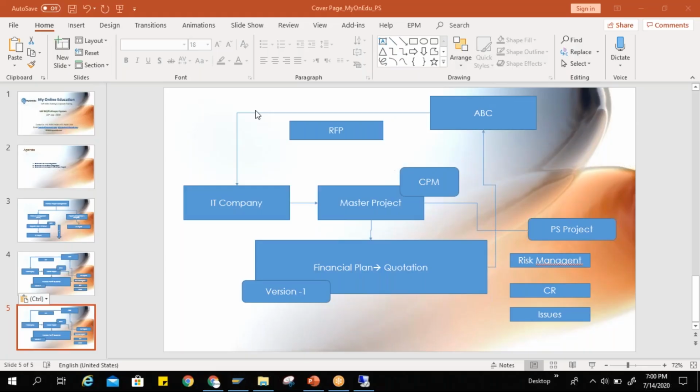Okay, so here basically what we can do, yearly when we are doing the maintenance, we can prepare a complete plan, because in PM we don't have anything to make it structured. So that is what we are doing in SAP: we are creating a structure in PS, and then whatever orders we are having from recommended machines, equipment, functional locations, we are assigning to the PS project. So let's say here I'm taking 1, 2, 3, 4, 5. These are my 5 machines, consider these are my 5 equipments. And when I'm going for maintenance, I need to create a maintenance order for individual equipments.